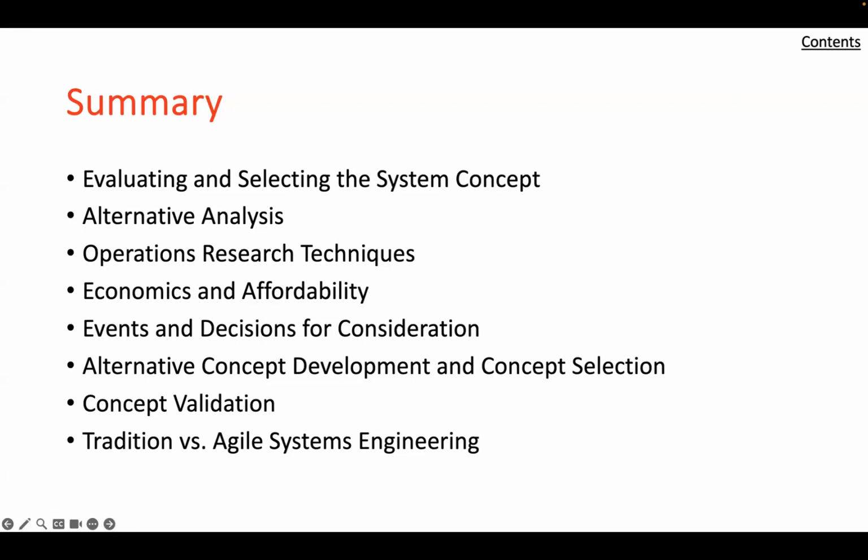System concepts are evaluated in terms of 1, operational performance and compatibility, 2, program cost and schedule, and 3, risks in achieving each of the above. Program risk can be considered to consist of a combination of 2 factors: likelihood that the system will fail to achieve its objectives, and impacts of the failure on the success of the program. Program risk can result from a number of sources: unproven technologies, difficult performance requirements, severe environments, inadequate funding or staffing, and an unduly short schedule.